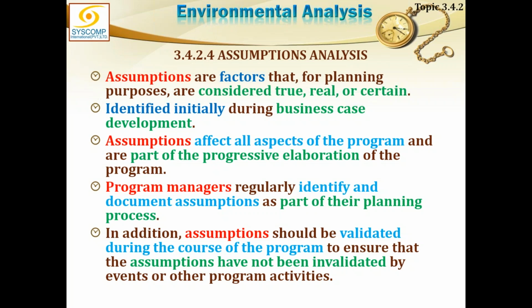Program managers regularly identify and document assumptions as part of their planning process. All the assumptions must be clearly spelled out and they must be written down somewhere. In addition, assumptions should be validated during the course of the program. While the program is going on, we still have to have some analysis to ensure that the assumptions have not been invalidated by events or other program activities.